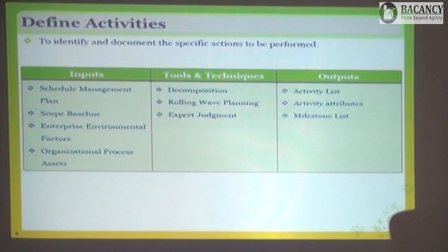Two milestones means you can add one more milestone here to show the start of this work package, and you will definitely need to have one to mark completion of it. Is that clear? And milestones will always have zero duration. Zero duration means no effort needed. No effort needed means no resource needed. No resource needed means no cost. Milestones are just representative tasks.